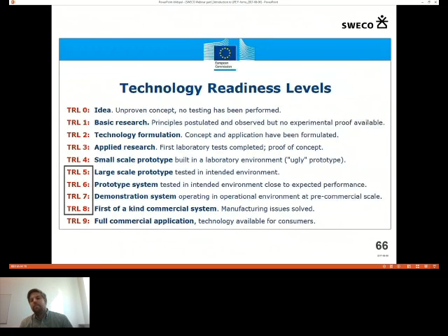If you think it's feasible or reasonable to carry out your actions, I mean, how do I think? I think that preparatory actions should be very limited. You're encouraged to have very small preparatory actions. And it's not likely during the preparatory stage, which should be maybe maximum 6 months, to bring a technology from level 3 up to level 5 to start implementation sections from there.